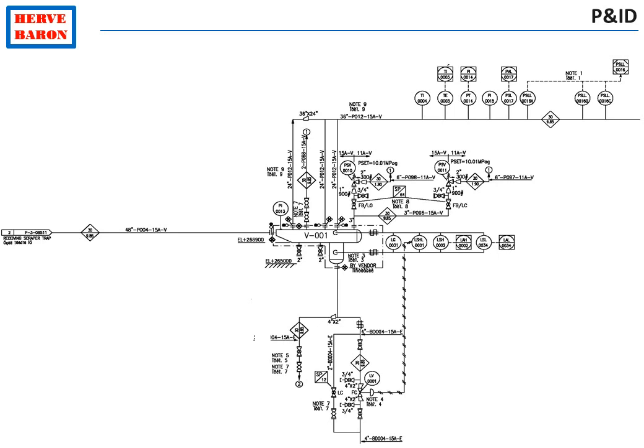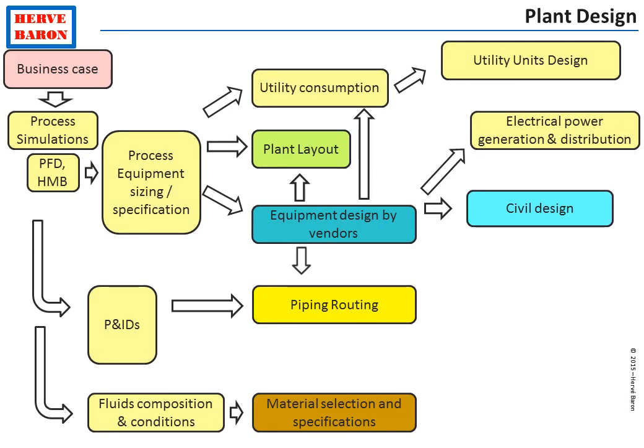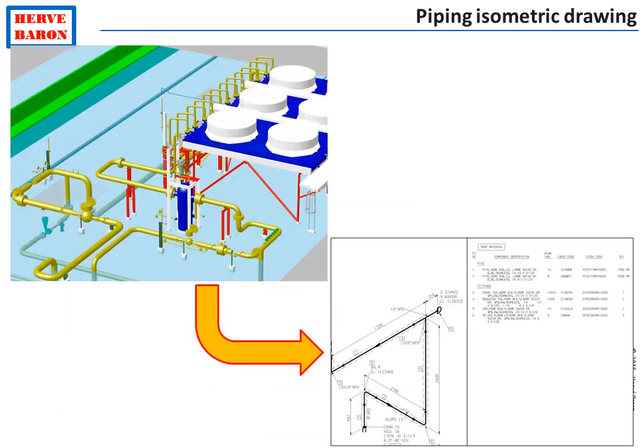As it defines the piping, it allows piping routing to proceed, including the routing in the 3D model and the production of piping fabrication drawings and bill of materials.